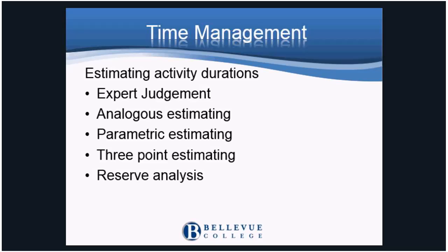The next step is to estimate the activity duration. There are many ways to do this. The first way is expert judgment, which is to ask the project team or subject matter experts how long it will take. Be aware when gathering estimations based solely on expert judgment.